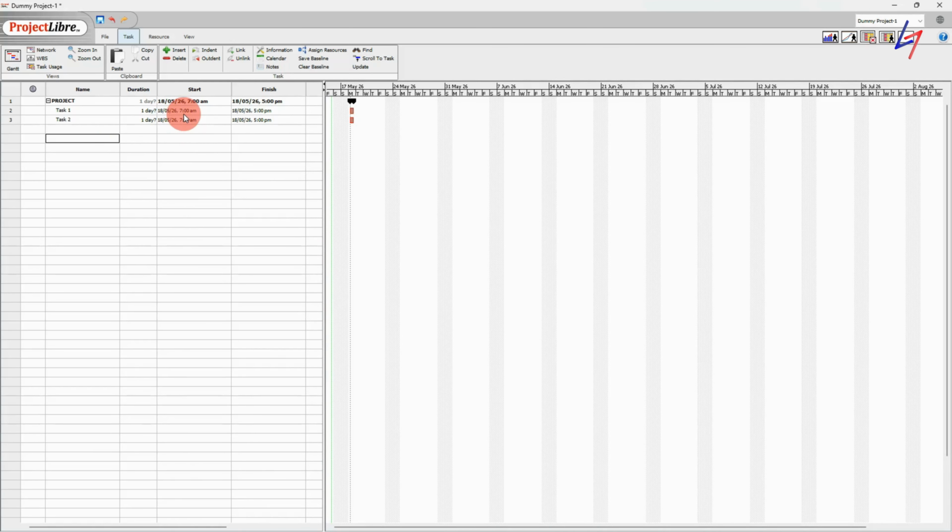So even though this work is starting at 7 a.m., it's ending at 5 p.m. that day, and the next work is starting at 7, the next work is ending. Now here he wants this to start at 7 a.m. and end at 2 p.m., right? So I will have to minus the 1 hour of lunch break that I'm providing. So 7 to 8, 9, 10, 11, 12, 1, 2 p.m. So it's 6 hours, right? 6 hours that I need to provide here.